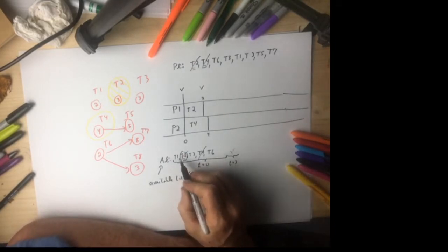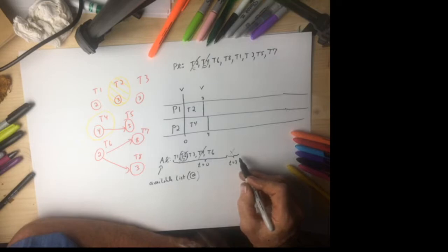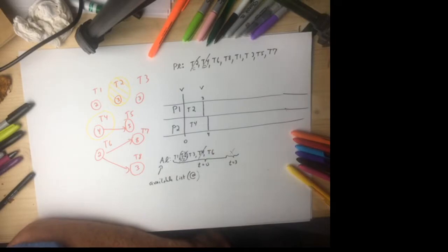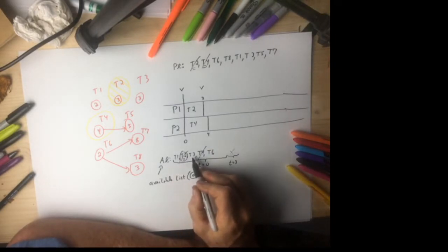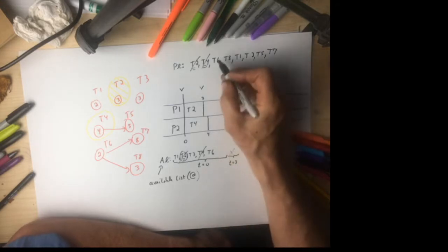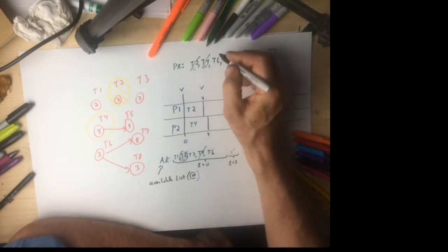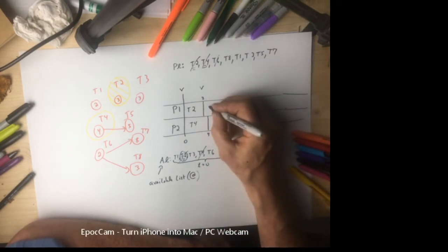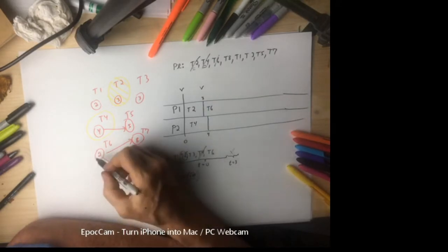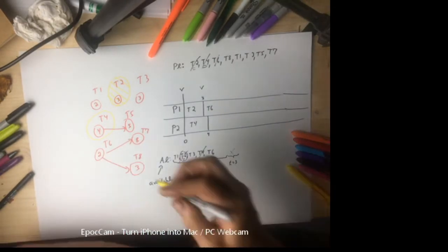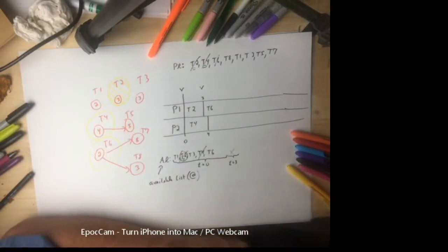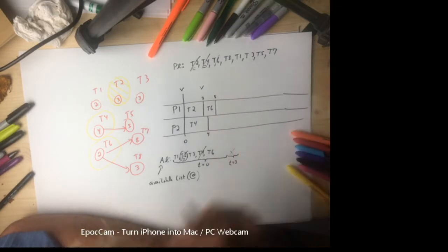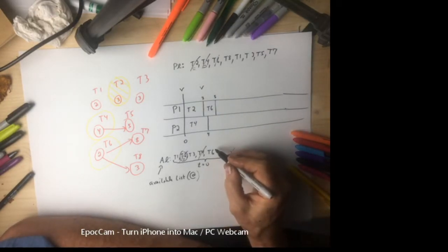That's okay. I have 3 jobs available at time equals 3, 1 person waiting, so I have to use the priority list to decide. Well, once again, I've got 1, 3, and 6 available. Oh, lo and behold, 6 is a really important job. We're kind of lucky it's at the front. Let's cross that out. And we're going to put in T6. Now, T6 is going to run for 2 hours, so I need to know that because I'm going to assign it. And 2 plus 3 means it'll go out to 5 o'clock. So I've assigned T6. I'm going to cross it out.